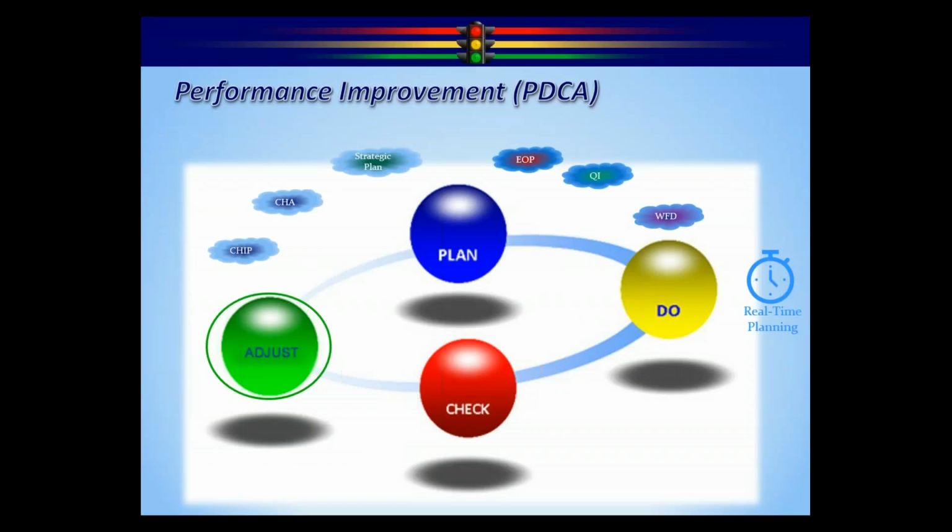In the adjust phase, at this point in time, we're going to want to make a correction here. A couple of different corrections we could make depending on the situation. So let's say we're just getting into the COVID time and all the resources in the department are going towards COVID. We don't have any additional resources to get us to our 25% target. So we might want to adjust the plan so we have a successful plan until this COVID thing is over with. So maybe we take the plan down to 21%, continue through the cycle, try to keep it at 21%.